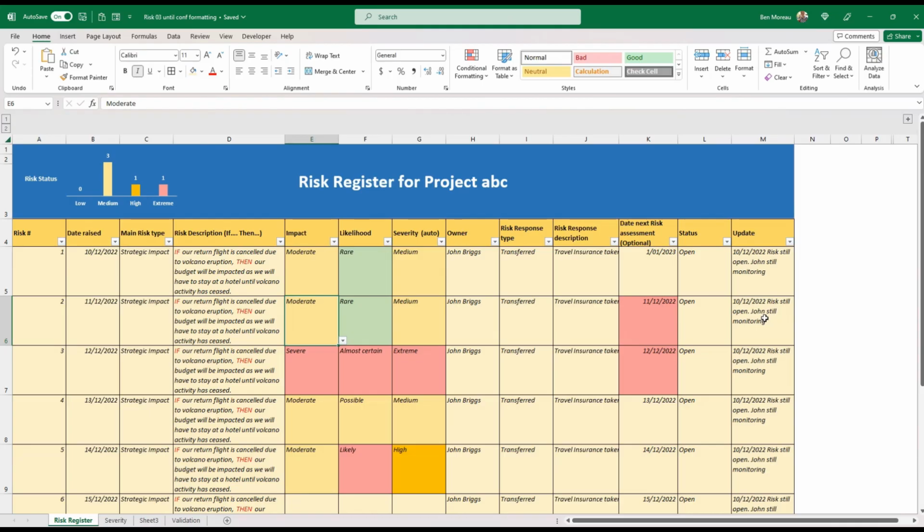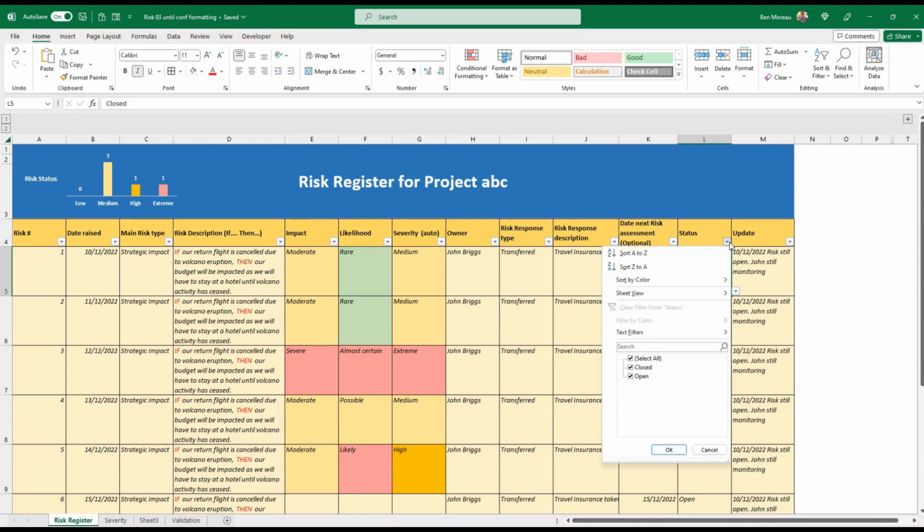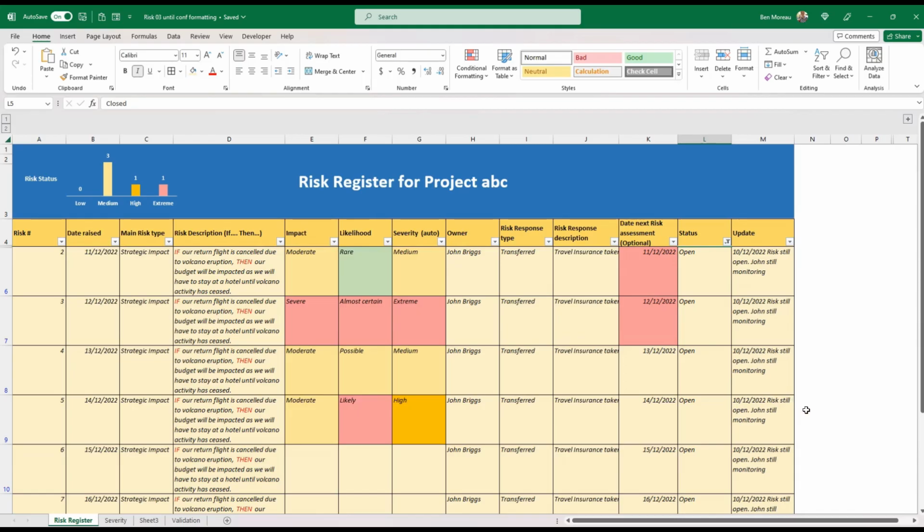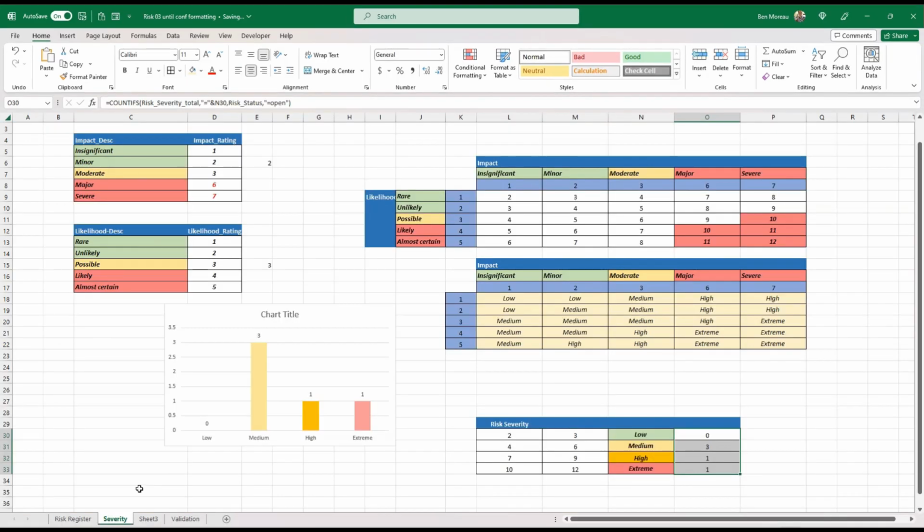And remember, risk management is obviously very important. Have monthly meetings with everybody involved. Make sure you review this, add more, remove some. There's no point having risks hanging in there when they are not valid anymore. So you would go there and put them as closed, and then remove them from the status view maybe, so they don't show up anymore. So that's pretty much it.